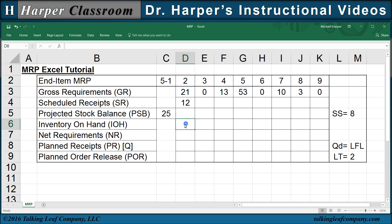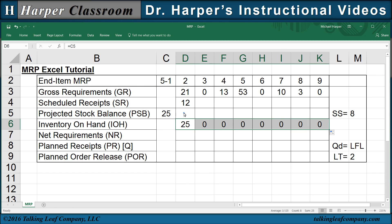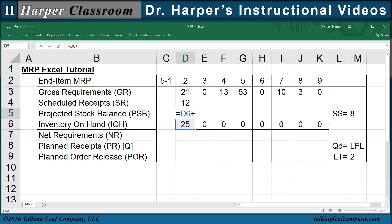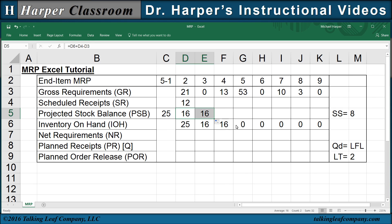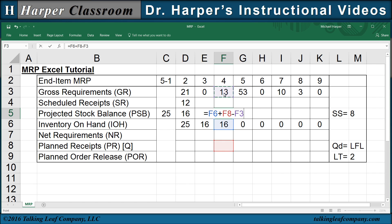First, the inventory on hand is equal to the projected stock balance of the previous time period, and we copy that over. Next, the projected stock balance equals the inventory on hand plus the receipts minus the gross requirements. Since we have a lead time of two, that's the same equation for the first two time periods. For the third time period, it's the inventory on hand plus receipts, but this time it's planned receipts, minus gross requirements. And we copy that over.